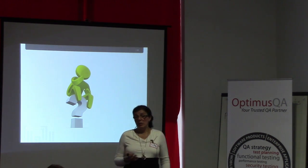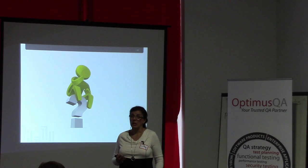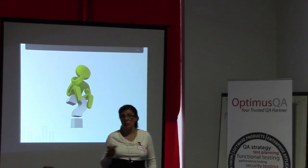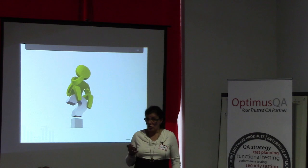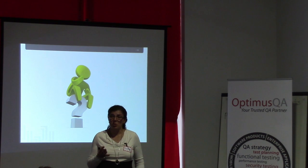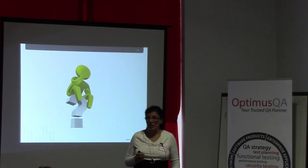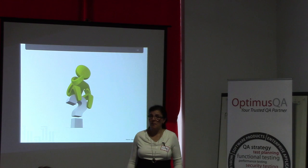And when you have such an obvious difference between your demand and allocation, it really helps to show, right? In a team of 18 testers, so 2 team leads and 16 testers, if I'm short 600 hours, I obviously cannot do as much. But if I'm short 150 hours, that's only about 10 hours per person. It's manageable, right? I don't have to go yelling and screaming, oh, I don't have a person, I can't do this work. 150 hours on a team this size could be doable, even if you're short.